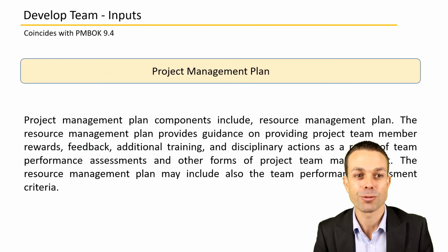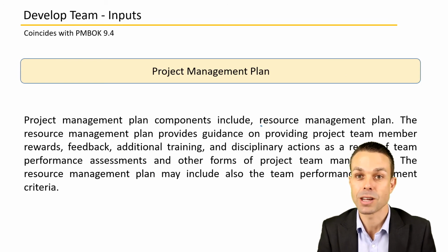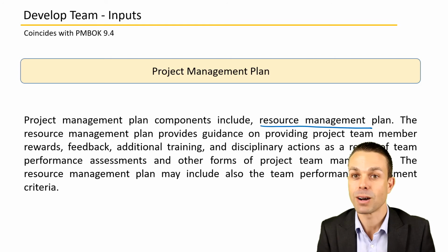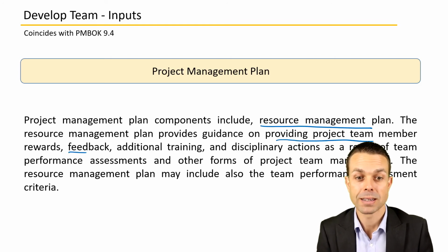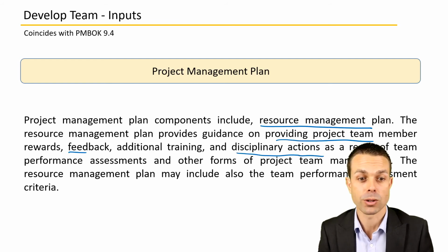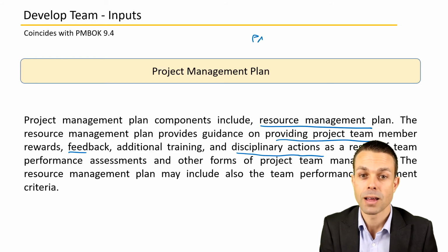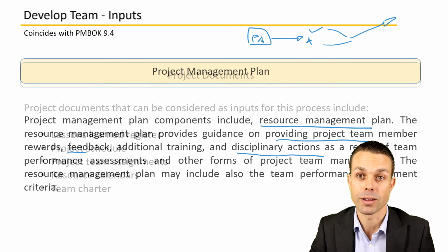Let's look at the inputs for developing the team. We've got the project management plan, of course. So this includes our resource management plan, and that provides guidance on providing team member rewards, feedback, additional training, or disciplinary actions as a result of team performance assessments. So we do a team performance assessment, and how is the team doing? Is it good or bad? Can we bring them back on track, or can we improve them further again?